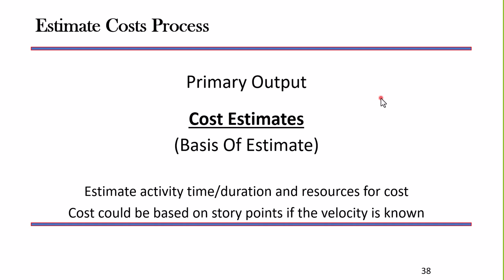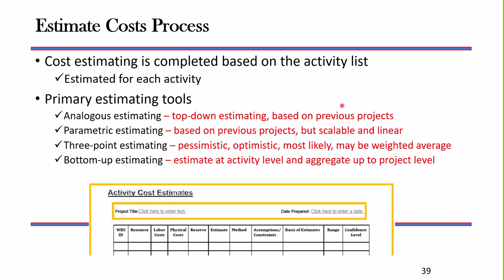I have to understand the cost so I can know when I'll be paying for those costs. I will tie my cost baseline, which is coming up, to my schedule so I know exactly when I will be paying for my activities in the project.